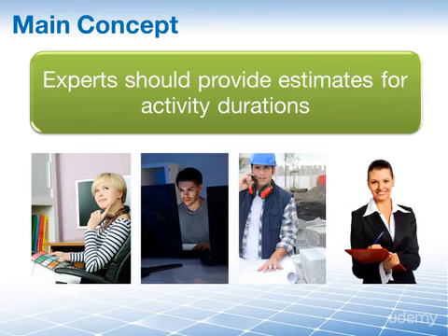And of course, ask yourself, as the project management specialist, so to speak, how long the project management administrative activities will take. So don't estimate everything yourself. If you ask the specialists, you'll be more confident in your activity duration estimates, and you'll also get their buy-in.